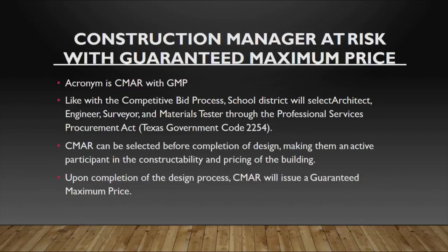So that gives the school board a lot of safety, because the CMAR is selected concurrently with the architect, meaning that as the designs are being built, the project manager, the CMAR, everybody's working together to make sure, hey, can this be built? Because a lot of architects like to design some things, just kind of draw some things that may not be buildable, that may have materials that are not readily available, or may be too expensive.